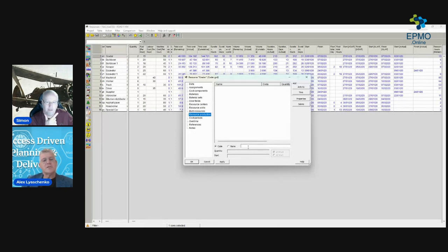Is it actualized? Like, as a PM, you say, I forecast to have 6 of these blocks made, but only 3 have been, and therefore it's going to drive some forecast as a result. Yes. From a resource perspective, you have consumable resources. So that will be a consumable type of resource. Okay. So you have renewable, like people, or equipment, but materials are a consumable type of resource. So when you do production, you produce a consumable type of resource, and these are consumed by a different part of the project. But maybe it's too much, maybe we come back. We're going too deep. Yeah, now we will do.